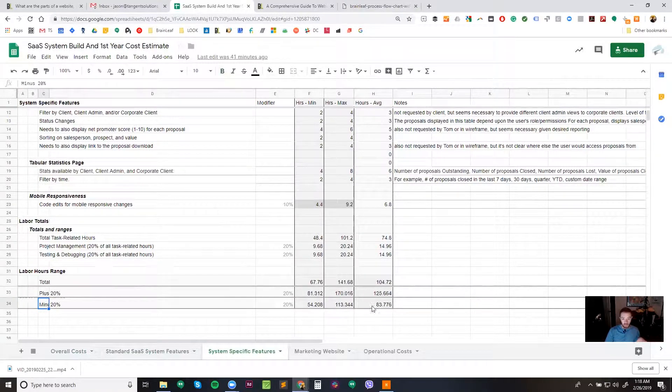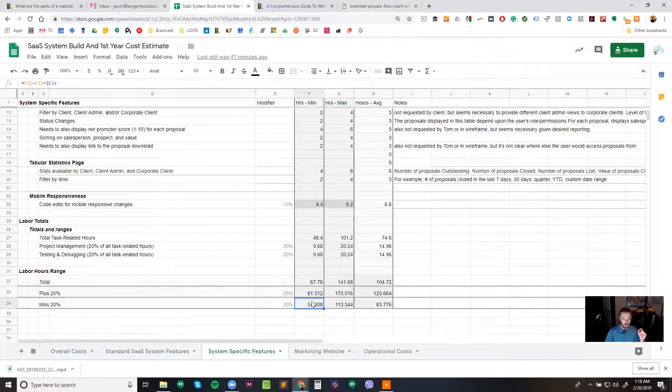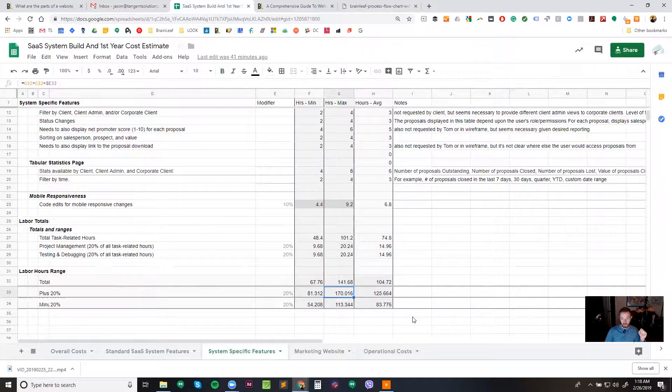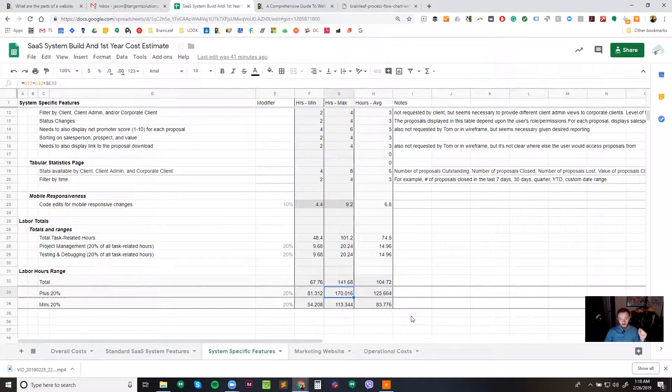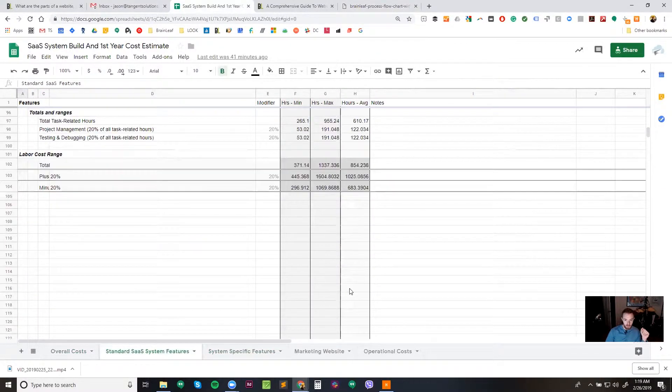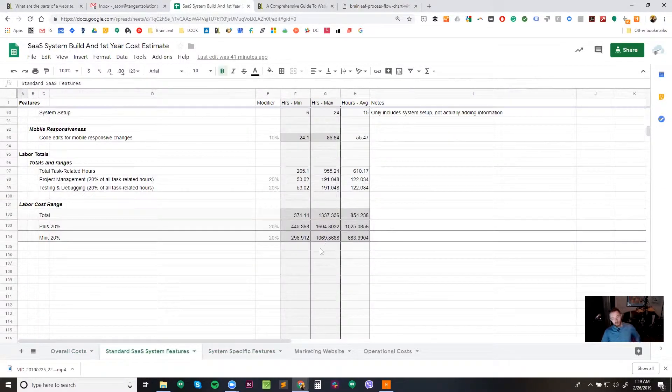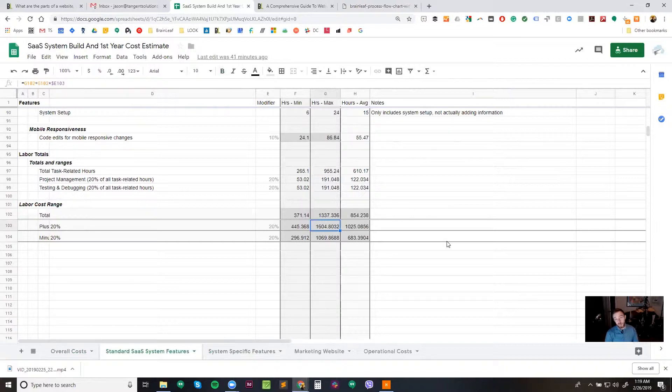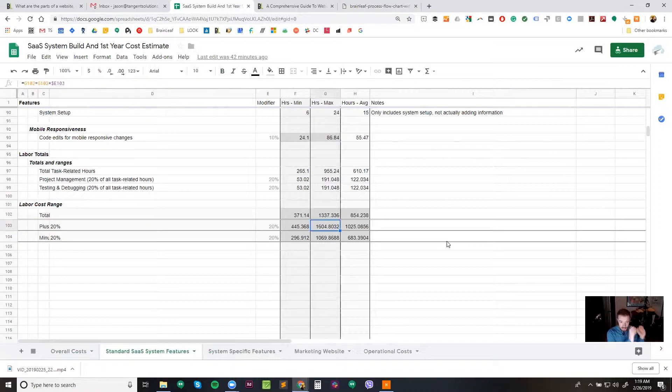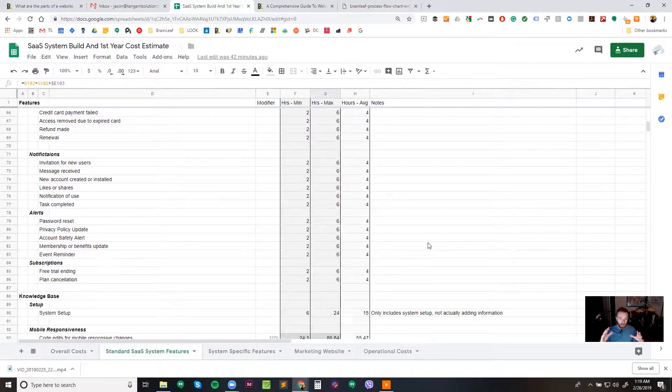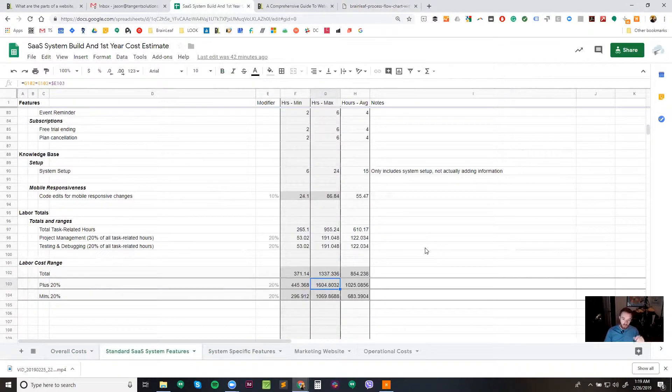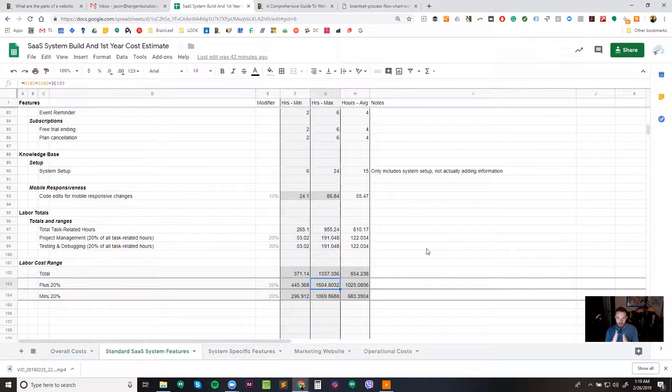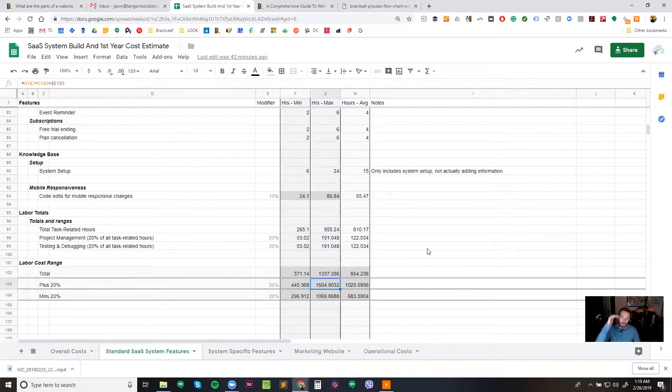And then we also do a plus and minus 20% of all hours for each area, so that people can see this is about the minimum, and this is about the maximum. And when we go to take a look at the overall, you can see it's really a big difference. In this case, you can see minus 20% at 54 hours on our minimum, and our plus 20% maximum is going to be 170. So that's a pretty big range. But let's come over here and take a look. I think we've got some bigger ranges here. Yeah, here we go. So 296 versus 1,604. That's a huge range. But the advantage is that when we get done, we can say it's definitely not going to be less than 300 hours for this part, and it's almost definitely not going to be more than 1,604 hours. And the more information we get from these customers and these clients, the more we can narrow that range down, which is why it's so important to go through each item one by one.